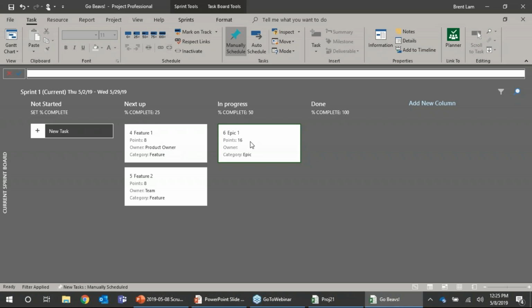So what I recommend in this case is don't do your planning, don't do your points assignments and your sprint velocity initially. Go ahead and do your sprint. Put in some stories that you think you can accomplish. At the end, when you're doing your sprint retrospective, then go back and go, okay, we know what a 1 is, we know what a 2 is because you've actually done it. And then you can add up those points and you automatically have your velocity.